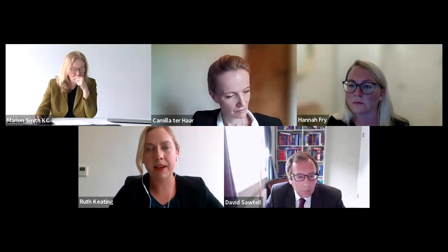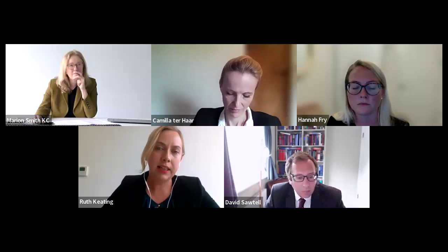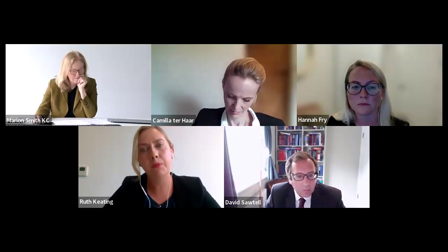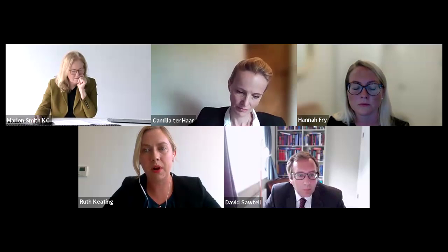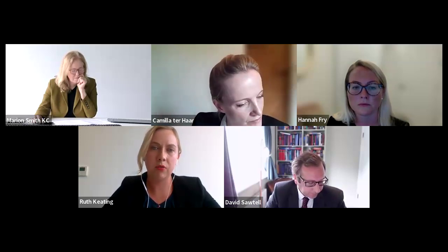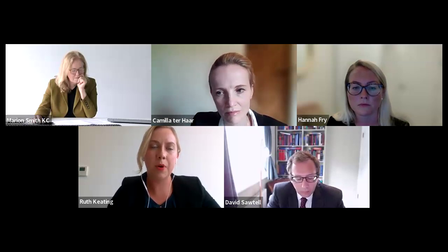And the final point, Marion, just to flag, it's not a change, but it's an important point, is that the updated JCT retains the optional provision in the contract particulars for an overall cap on the contractor's liability for loss of use, loss of profits, and other consequential loss arising from any inadequacy in the contractor's design. So again, something for all parties to be aware of.